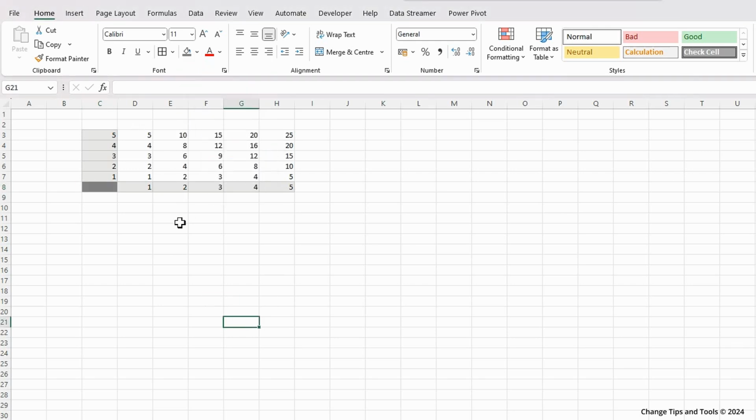Then what I'm going to do is some conditional formatting on these cells because I want this to be color coded. Basically anything where the severity score is equal to 5 or below 5 is going to be green. Anything that's equal to 10 and below 10 and greater than 5 is going to be yellow, and amber, and then red accordingly.